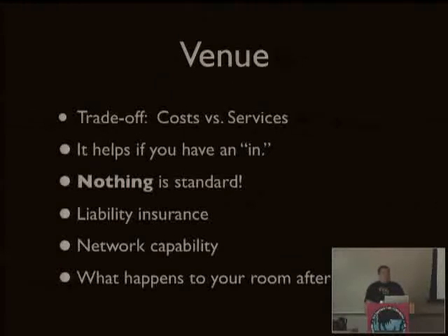Another thing you have to realize about venues is they're trying to maximize the amount of income they can make on every single room. Especially if it's a college campus and you're talking about classrooms, it's not such a big deal. But if you're talking about a big conference facility, and you say, our event runs from 8 a.m. to 5 p.m. 4 days in a row, they're going to rent you that room from 8 a.m. to 5 p.m. 4 days in a row. And if they can find somebody that will rent that room from 7 p.m. to 9 p.m. on the third day of your conference, they will do so.